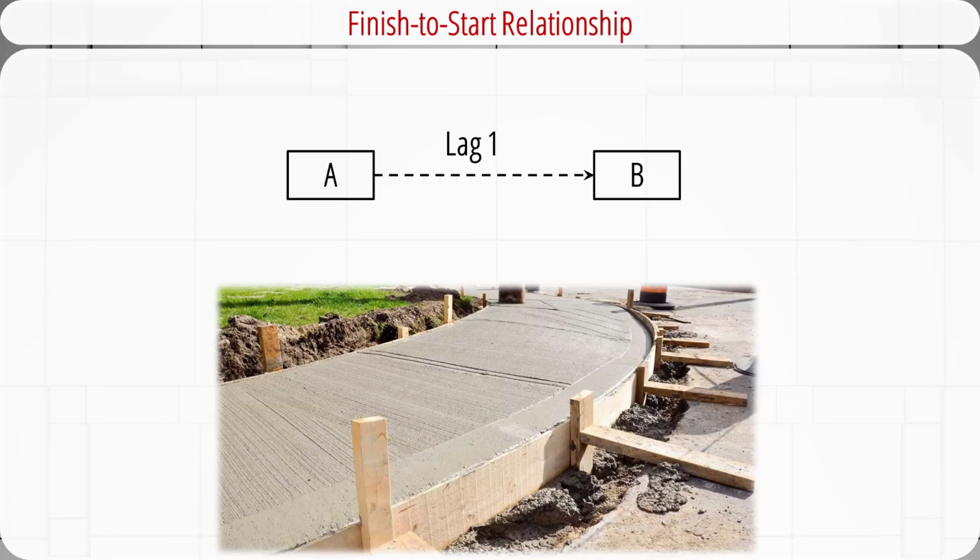The finish to start lag is used in situations where the next activity in sequence must be delayed even when the predecessor is already complete. For example, removing concrete forms cannot begin until the poured cement has cured for 1 day or 24 hours. Or, it may take 1 day to place the order, but take 3 days to receive the goods.